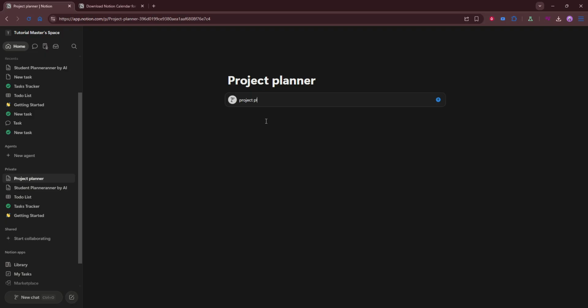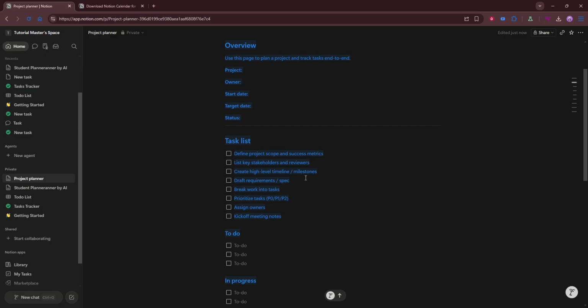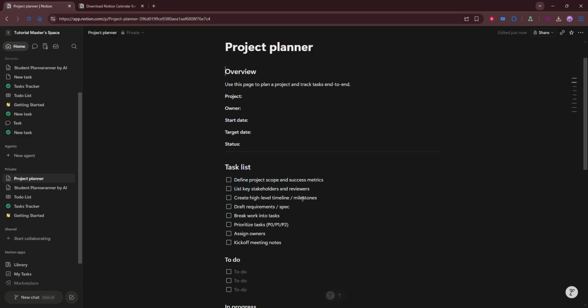This is where you break the larger plan into actionable items. Keeping tasks tied directly to the project makes it much easier to stay organized and avoid losing track of work. As you add tasks, make sure each one is specific enough to be completed and reviewed without confusion. Once your tasks are in place, explore the different project views available in Notion.